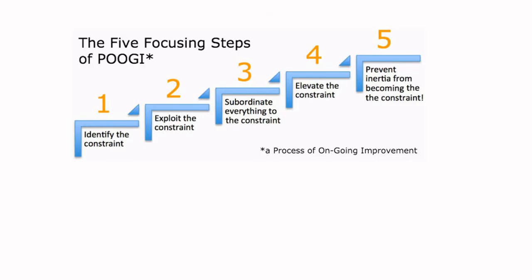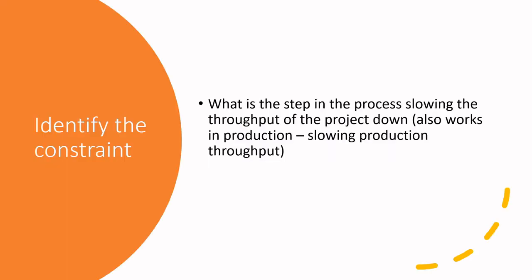We'll talk about resource planning in another slideshow. In the Theory of Constraints five focusing steps — there are five steps: identify the constraint, exploit the constraint, subordinate everything to the constraint, elevate the constraint, and prevent inertia from becoming the constraint. There's some background noise — I have a visitor in the room having cereal and emptying the dishwasher. The fun of working from home!